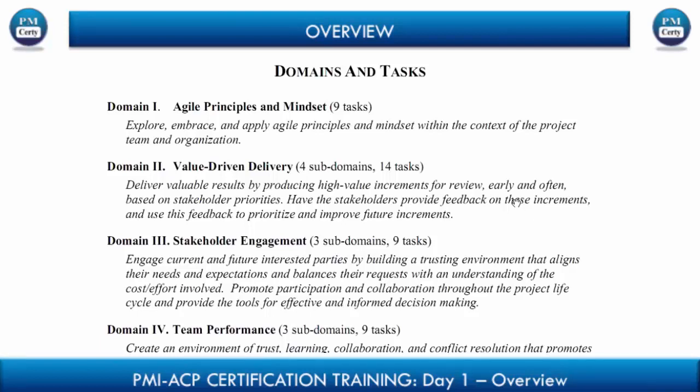Pretty much all our companies have contracts with customers. We treat any change, if not with suspicion, definitely with a kind of resignation, because it means that we'll have to go through a change request, we'll have to actually see the impact of the change, we'll have to decide if it's really a large change, whether we need to go back to the contract, put an addendum to it, have the customer agree to the pricing. So it's all pretty tedious.